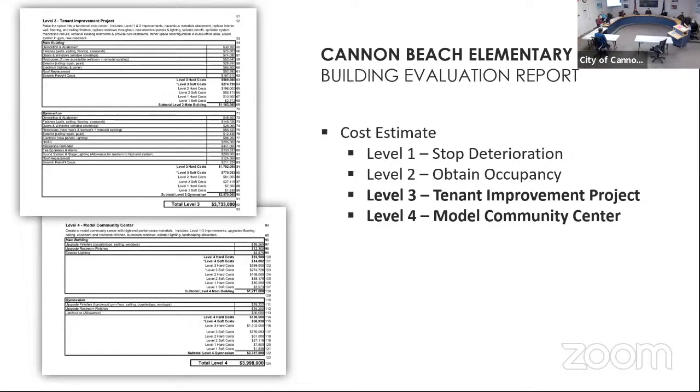Let me just jump back to the ADA questions. One that really confuses me cost-wise is 25% of the project. If you were doing a project and just did absolutely everything you possibly could to improve the ADA, but you're still way under the 25%, you still have to figure out more stuff? No, it's 25%, or until the building is fully compliant. And you take out some items from that 25%. So seismic retrofits do not count towards that 25%. Fire and life safety upgrades don't count. So sprinklers, seismic retrofit, you can take that all out and then take your 25%.